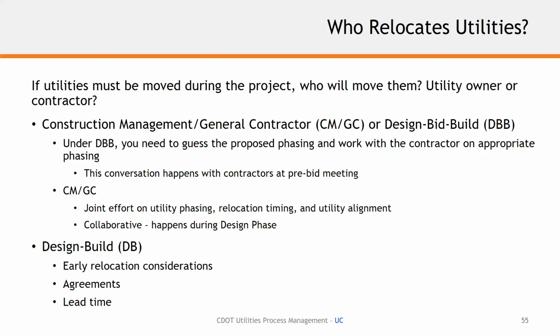And it could really hinder the design build team if they had to start that from scratch the day they walk onto the job. So that's really what we're trying to emphasize here. They're not common for design build, but there are instances where we would take that on and then spell that out in the RFP so that the contractors or the design build teams know about it.